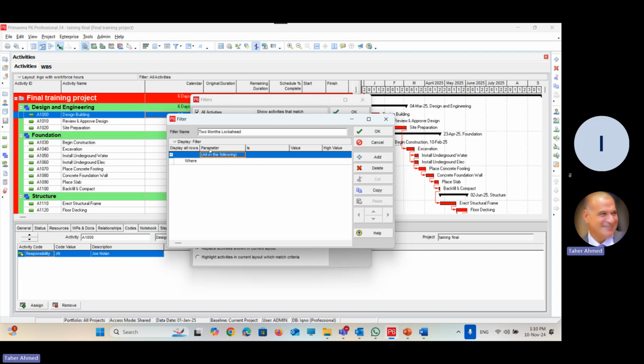in the previous window. Well, if he asks you, I want to see the next 2 months activities belonging to Ingo, create a filter representing Ingo's activities and a filter representing 2 months look ahead, and select both filters from the previous window as well. I don't recommend at all creating multiple criteria in the same filter, because usually your boss asks for too much.